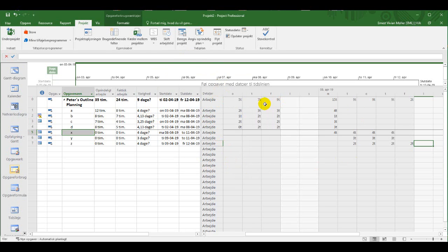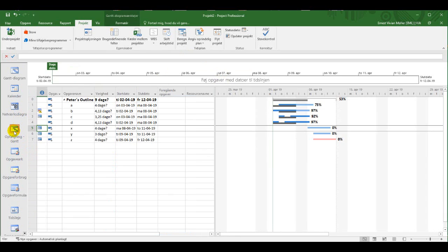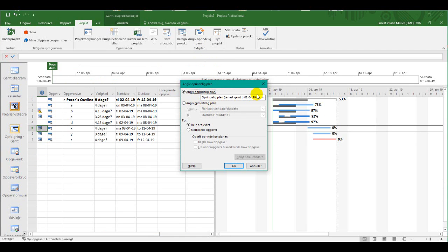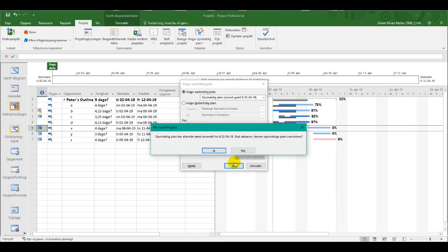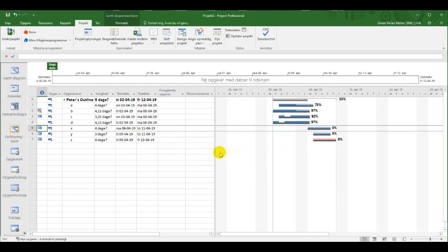And then I'm going to set a baseline again to overwrite the old baseline. I've now saved the original baseline. Click in here and I am going to set the baseline. Again, the current one, and you will see everything will change now. As you can see, the baseline is reset, but I have saved the first baseline, which can be put into these columns as baseline 1.